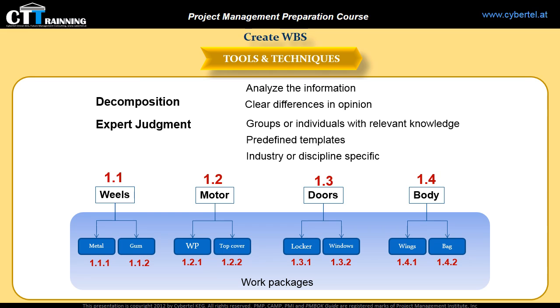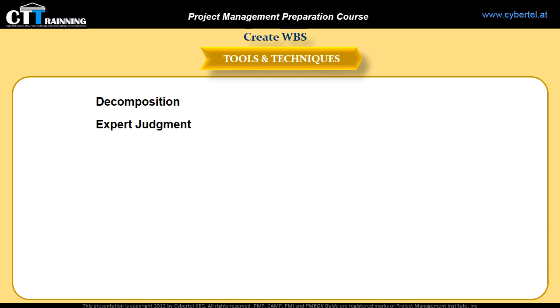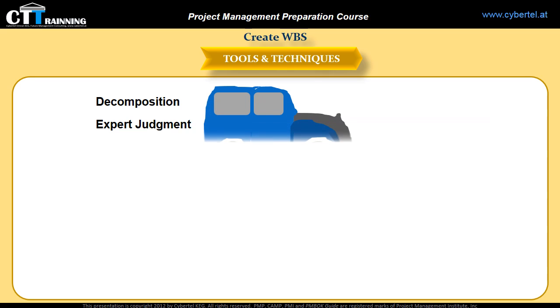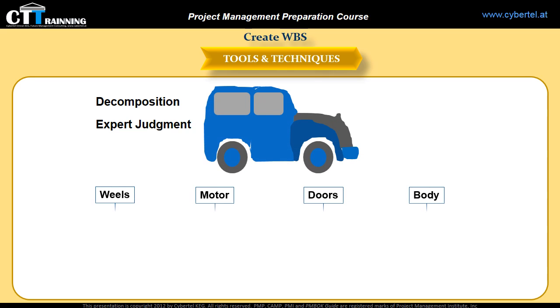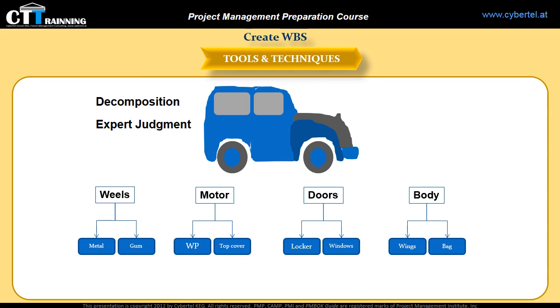How can I perform a work breakdown structure? There are some known methods to structure the WBS, such as the top-down structure. Also, a bottom-up approach can be used during the integration of subcomponents, or you can use the organization-specific guidelines and WBS templates from the organizational process assets.